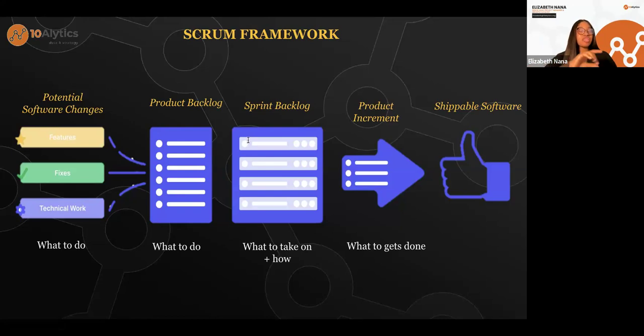Right? Now, those 5 things, you go into your product backlog and you look at the list, the 70 things that you have listed, and you pick 5 important things. And you say, these 5 things are the things I am going to buy next month. Now, that is what makes up your sprint backlog. Your sprint backlog is what you are committing to from your product backlog. So you pick out the items on your sprint backlog from your product backlog.